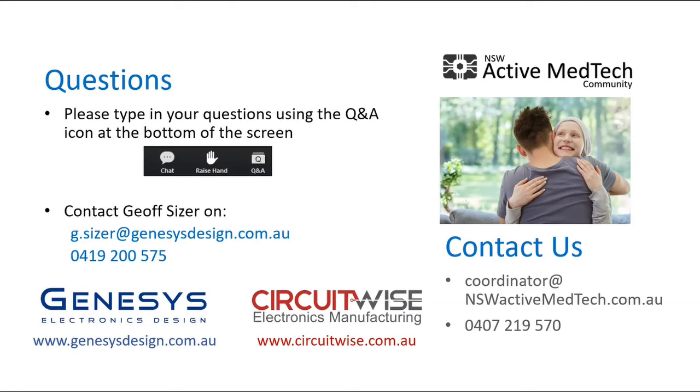So in the early days, you also definitely need to have regulatory compliance knowledge so you know what you're facing. As time goes by, in the mid stages, you probably need to bolster the regulatory side in preparation for the final compliance processes. You might like to start to think about how you're going to set your quality system up, so you might need resources in that domain. And in the electronics and software side, making sure that the expertise available to you can continue to have meaningful dialogue with, assuming you're having them, subcontractors involved as suppliers. When you're getting to the far end, you have to start thinking about having all of your documentation under configuration control, you have to think about all of the documentation you need to submit to the regulators, and also setting up your supply chain for manufacturing.